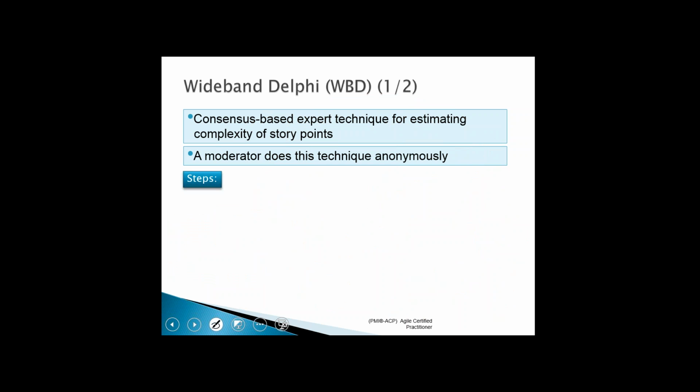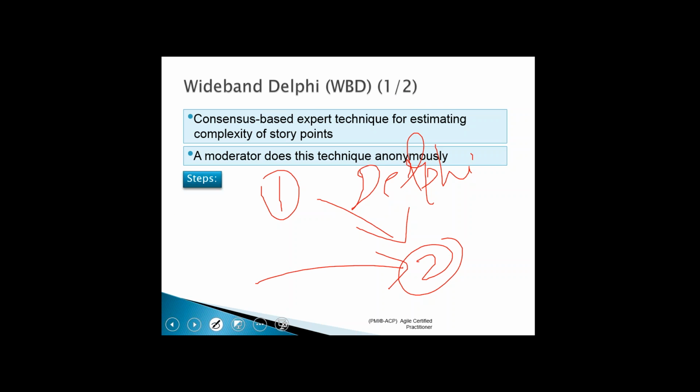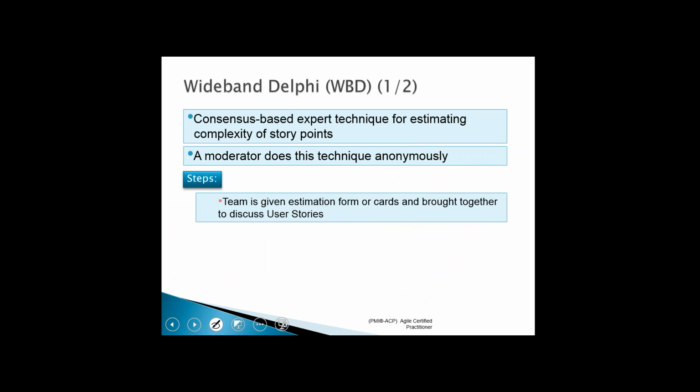Right? After that, you once again at the end call everyone to another meeting. So you first call them for a meeting, then you follow your regular Delphi technique, then you call everyone to the meeting again. And here you discuss everyone's findings, everyone's report. If there is any further clarification, you do that. That is what you do for estimating your effort or user story points. All right.